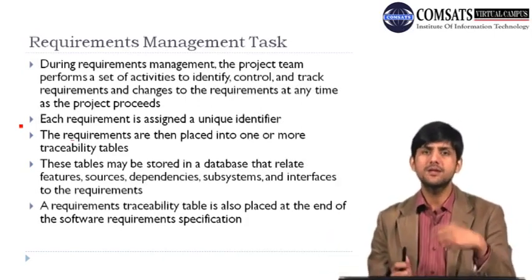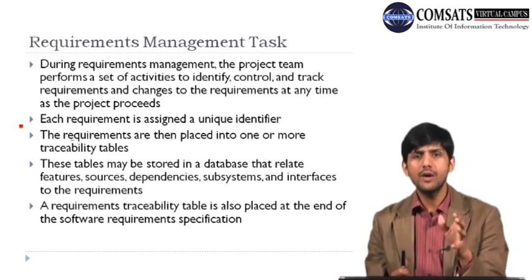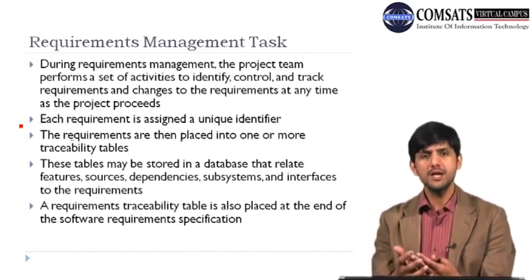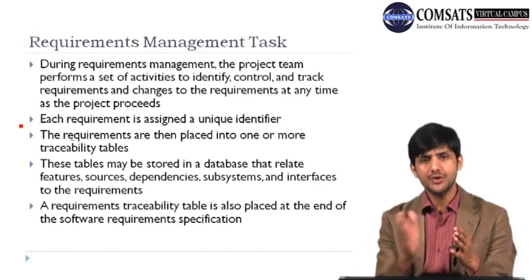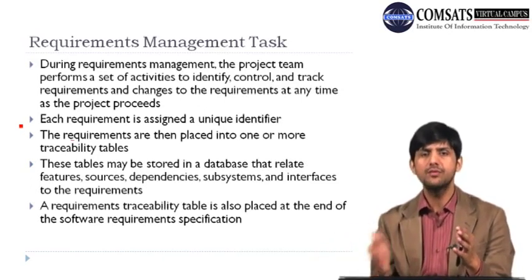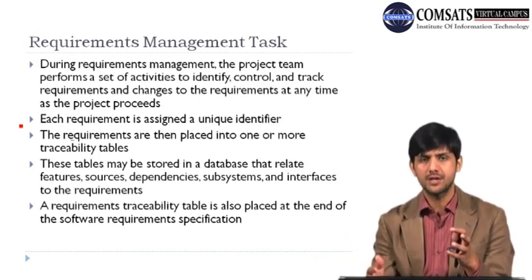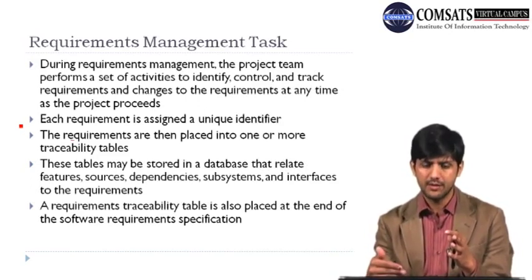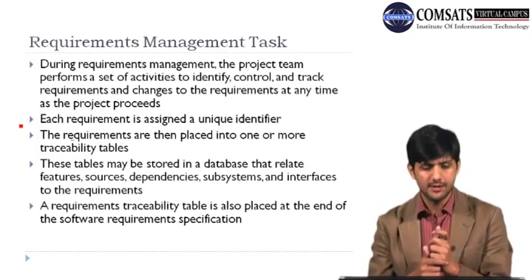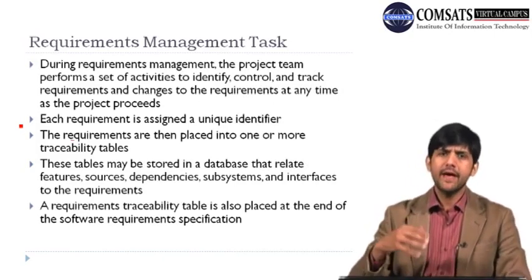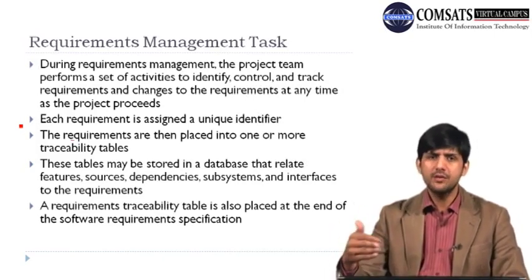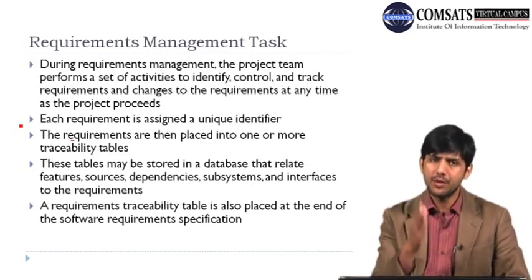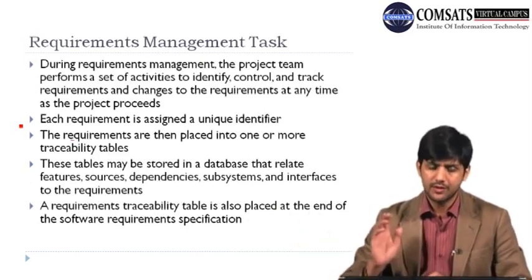For example, if there is a change in a particular requirement and you want to evaluate the impact of this change and control the overall change, and you have not maintained the traceability of that requirement through your system, you will not be able to correctly analyze the impact of the change, and you will not be able to evaluate it in a fashion that ensures you implement the change correctly. So you can put them in a database, or maintain an Excel sheet, or whatever suits you. You just need to record this traceability from requirement to the different parts of the software that you are producing.